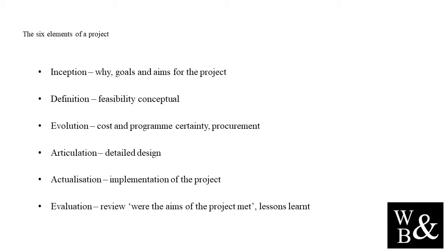This is usually achieved through production of concept options and feasibility studies. For example, if considering a new road, in this element, you and the project team may consult with stakeholders, look at possible route alignments, and possible economic and environmental impacts of each option.